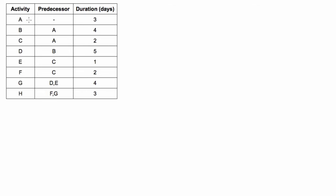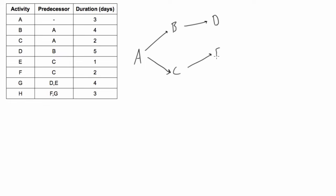First things first, let's do a rough draft. Activity A is the first activity in the project because it has no predecessors, so we'll draw that. Activities B and C both depend on A, so we write activity B and activity C. Next up we have activity D and this depends on B. Now activities E and F both depend on activity C.